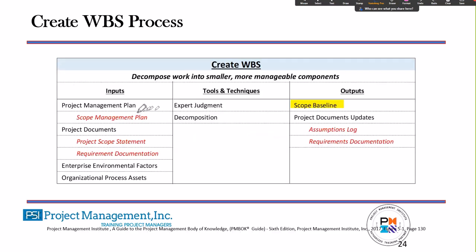Here we have our inputs, create WBS. Notice that I have the project scope statement as an input. I also have the requirements documentation as an input. It would be a reference document for me to use. And I will decompose that scope statement down into the scope baseline. And that scope baseline includes the WBS, the WBS dictionary, and the scope statement.